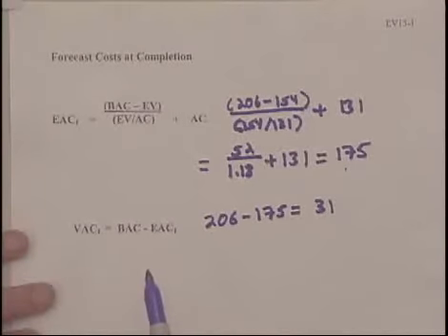And this forecast is probably pretty good because it's based on the project being 3/4 of the way done, which suggests that CPI should be pretty stable, and this forecast should be fairly accurate.